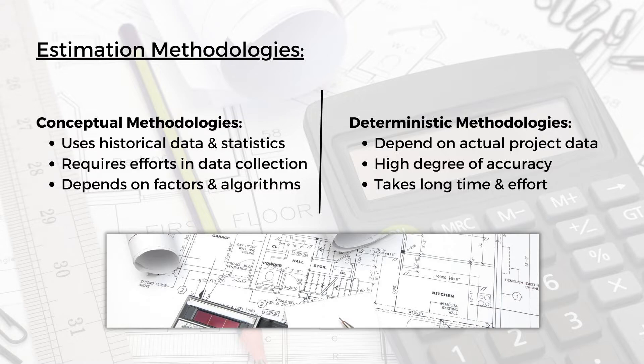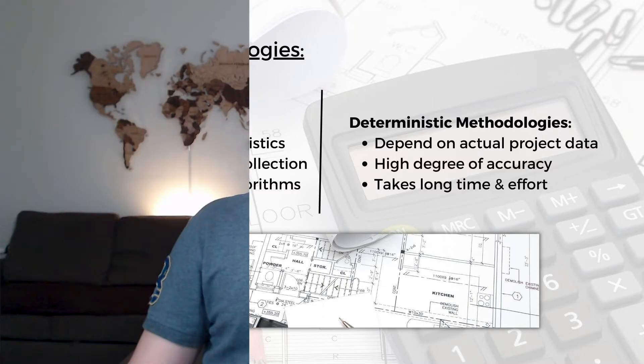The deterministic methodologies depend on actual project data — the drawings and specifications of the project itself — not just historical data. This gives a very high degree of accuracy, since all the scope is defined in front of you. However, it takes long time and effort to prepare because you will need to prepare a BOQ, get quotations, and incorporate everything. I am Ahmad Adil and you are watching Cost Engineering Professional, where I help you develop the required skills and enhance your knowledge to elevate your cost engineering career.